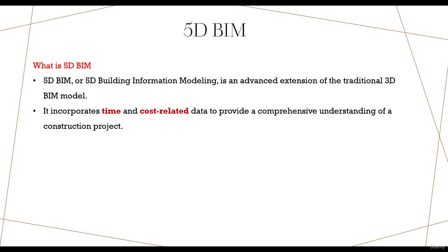Because the cost is not just a material cost, it's also a labor cost or a construction sequencing cost. So first you need to add the construction sequence and add the cost for it, after knowing how many days or how many weeks it takes you to deliver a certain stage of the project or a certain phase of your project.